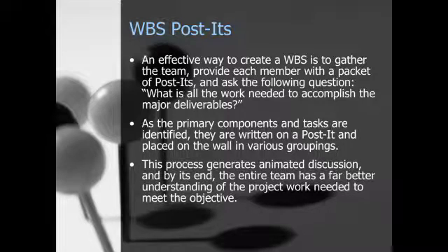So an effective way to create a work breakdown structure is to gather your team, provide each member with a packet of Post-its, and ask the following question. What is all the work that is needed to accomplish the major deliverables? So you put your deliverables on your charter. Now you're going to take those deliverables and think about the work that it will take to accomplish that.